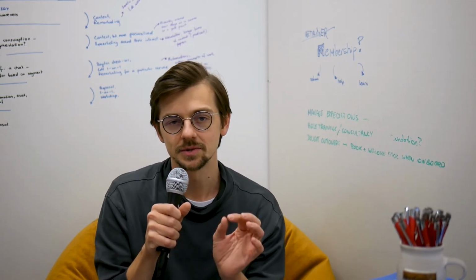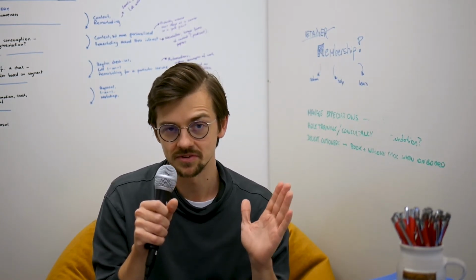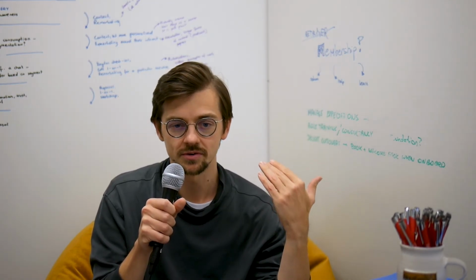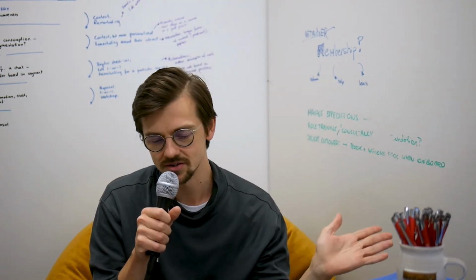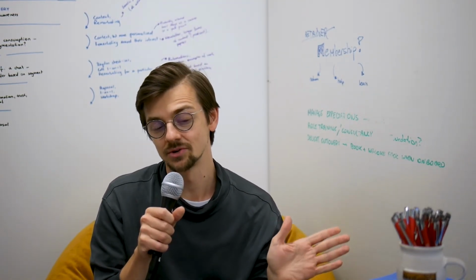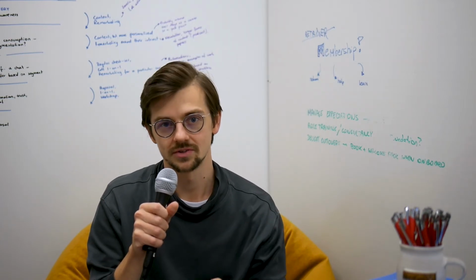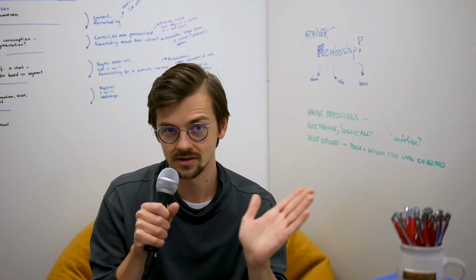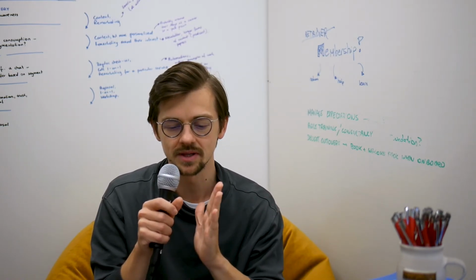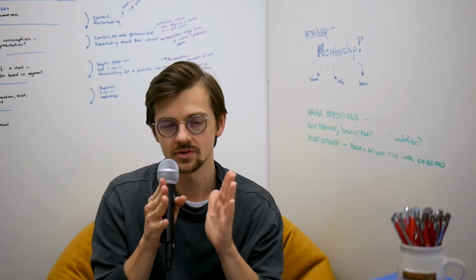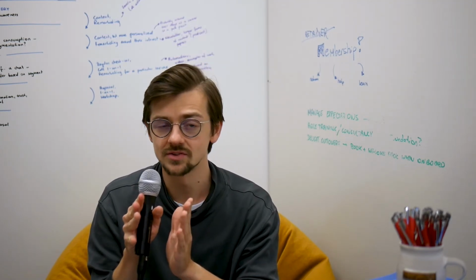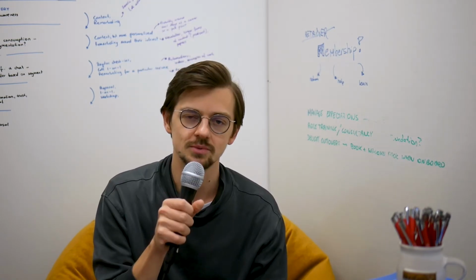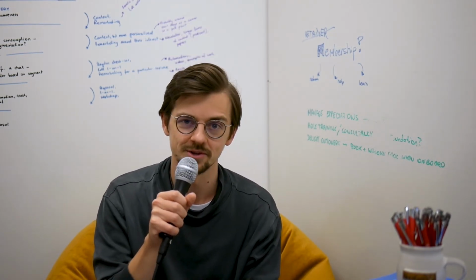In a pill, a sprint is an agreed amount of time that will be used to deliver something. You have a queue with features like navigation, newsletter, etc. And you estimate that you will take 2 sprints to deliver these. And a sprint can be a week. As I mentioned, in the websites world, we keep the loop quite short. So for us, it's a week. But in more advanced and complex projects, maybe between 2 to 4 weeks each sprint. So just to bring you up to speed very quickly, sorry if I forgot to mention that earlier.